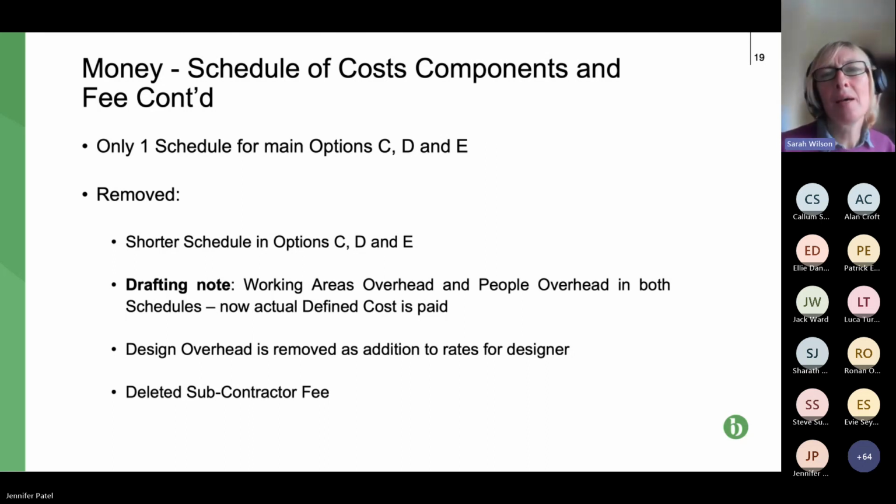For things like the electric used on site, small tools, so relatively low cost items, I think this isn't particularly helpful, because it just makes it easy if you've got a percentage figure to use for small cost items. Now you've got to prove your cost, which is fine if it's substantial amounts, but if it's small amounts, it's probably going to be quite difficult.